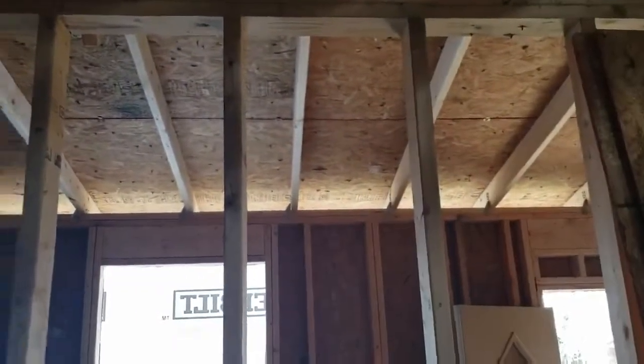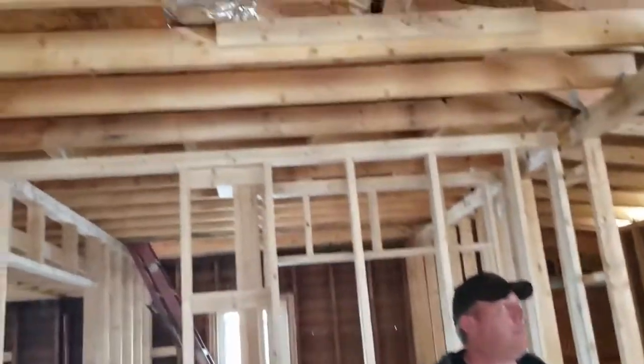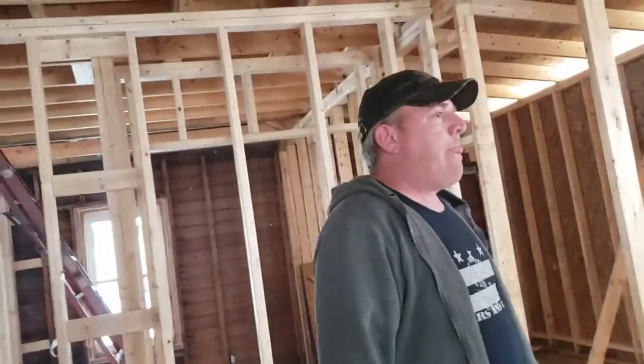Exactly. Look at all this new wood. Did you know this was going to be the magnitude? We knew the roof was coming off. We got three initial quotes on the roof, but when we got into tearing the roof off and tearing the walls, it was a shell, but you couldn't see because there was subfloor. When we got down under the subfloor and saw that it was rotten, it was cheaper. It sounds crazy, but it was cheaper to tear it down and just rebuild it. We would have spent more time trying to bring it back. It doesn't make sense.